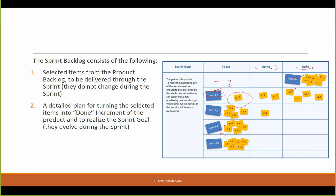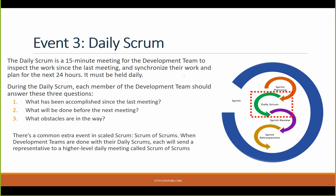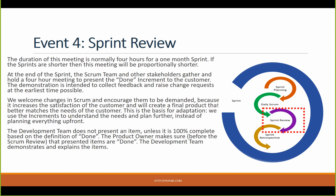The entire system of a user story is the definition of the sprint plan — a detailed plan turning selected backlog items into an increment of the product or a release. Now, the Daily Scrum answers three questions: What has been accomplished so far? What will be done next? What are the obstacles that are in our way? That is the Daily Scrum.